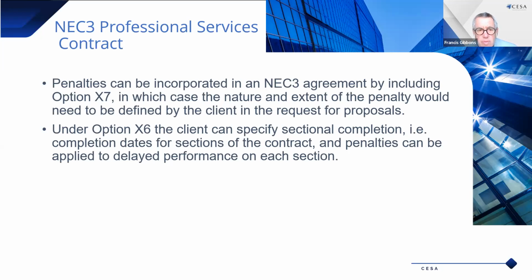An example from one of the clients, a state-owned enterprise that uses NEC3, is Transnet. And there, again, it's the amount of about 2,000 Rand per day and an upper limit of 10% of the contract value. So these can build up quite substantial amounts.